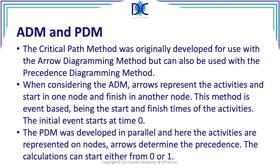In the ADM, the period from zero to one represents the first day, equivalent to day one in the PDM using ordinal numbers. You can also perform PDM calculations starting from zero — both approaches provide the same information. Starting from zero has certain advantages when we look further at the different possibilities, including the PERT method.